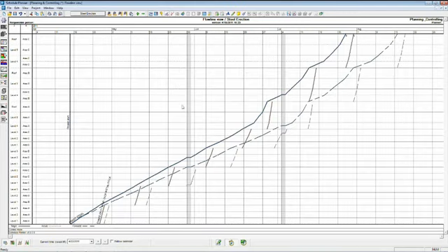And what you can see on the screen here, this bold line is our targeted activity for erect steel, and the dashed line is our forecast. Now, what this means is that based on the rate of production that we've seen over the past week, we're running behind on level 2A, and the program is forecasting, based on that production, a delay of 1 to 3 weeks to complete, to top out on steel.